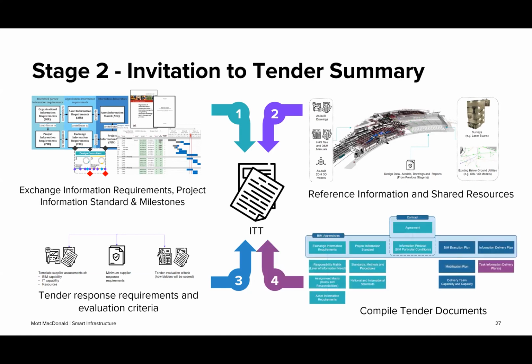And finally, all of these pieces of information that you require to go into your invitation to tender need to be put together in an agreed contract configuration. So you're including in there your requirements, the standards you're following, the contractual conditions, and also that all sits beneath the lead contracts that you're looking to establish with a commissioned party.